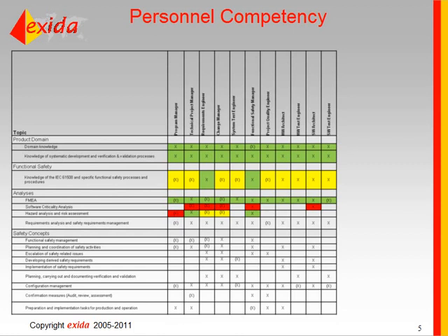need to go through and analyze the people that are assigned to the project and ensure that they have that competency. And it won't be uncommon that you'll find maybe somebody doesn't have a specific skill that's needed, and you'll need to come up with a plan to rectify that. And so that's what the color coding shows here. Green means the person fully has that skill required. Red means they don't, and yellow means that they partially have it.